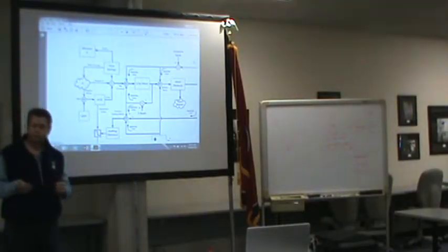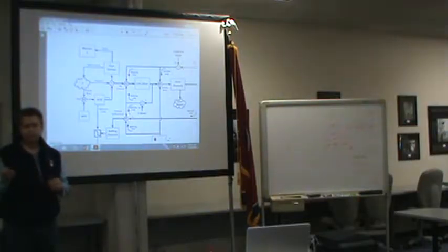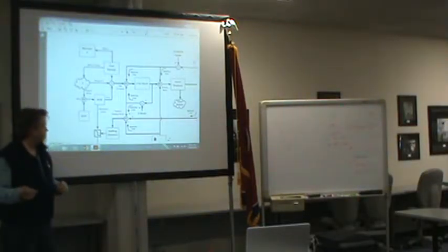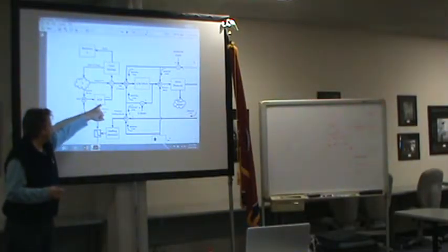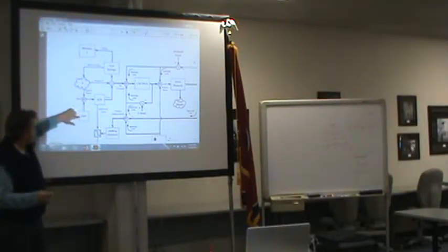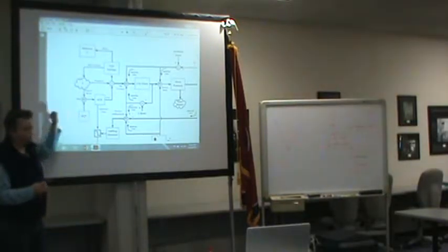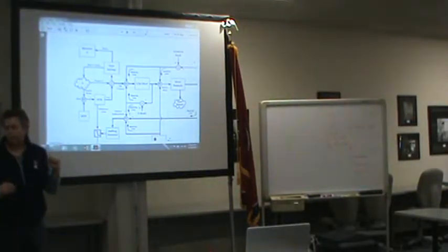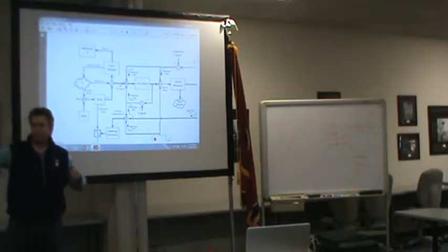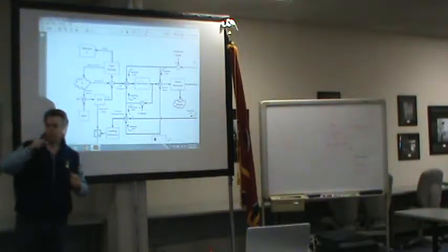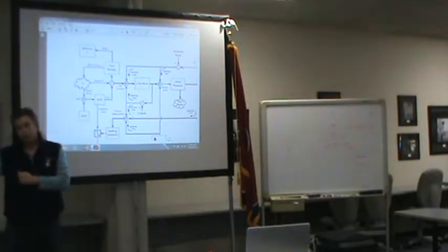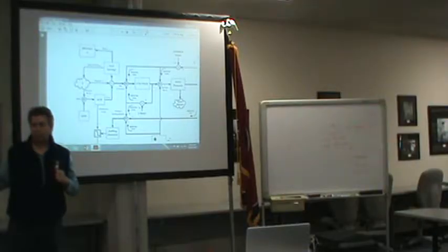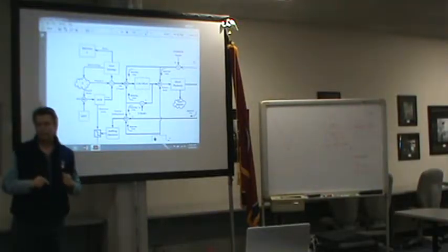The way they sold it was something called the annual cost baseline, ACB. I get it wrong, I'll remember. It's an annual budgeting process, but it's driven by a merger transformation plan that was put in the proposal. And they said for the next 10 years, this is how many people we need at each site for these operations, by people who had never worked at either site, to a customer who had never thought of it that way.